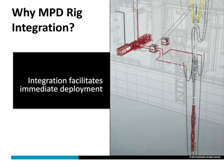I'll briefly talk through some of the rig integration pieces we look at on a weekly basis. I'm trying to create enough concepts so that if an operator comes and says they have a well problem, or a drilling contractor says they want to respond to a tender, we can tell them exactly what they need, how long it's going to take, approximately how much it will cost — based on the area they're trying to operate, the regulations, the class of the rig, what's known about the operator's wells, and the availability of current equipment. Instead of shutting down rigs or pulling them into shipyards for months, we're trying to minimize the time to respond so that rigs can mobilize sooner and go to work sooner.